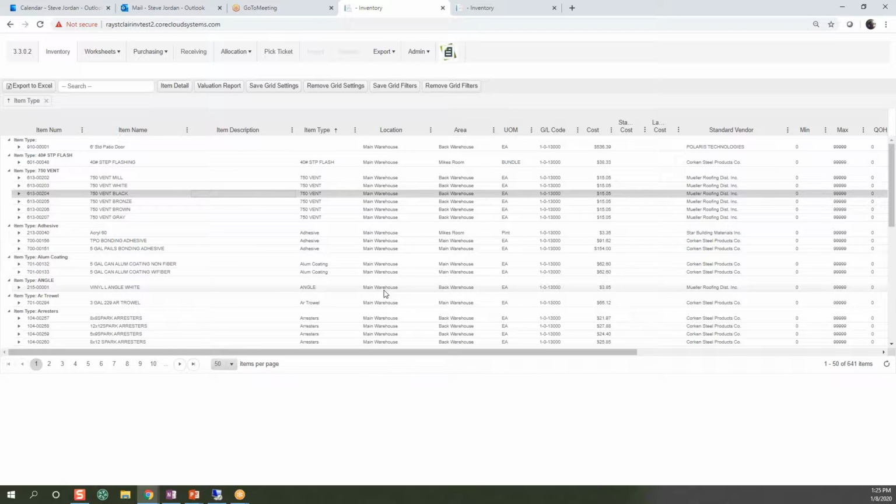You would go both ways with that, because in your estimating system, like if you're using Timberline estimating, you'd build your basic inventory listing or your material listing here, put your standard vendor and your standard cost on there, and that way when you import up the estimating system, or if you're just using an Excel spreadsheet, you start working from a predefined cost.